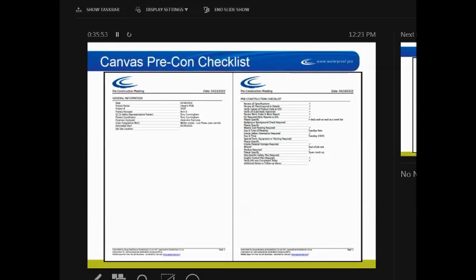Verify the copies of product data and SDS. I went on a pre-con last month, and we didn't have the product data. We were trying to pull it up on our phones. We went to Google, trying to pull up the installation details because we didn't know the overlap of the waterproofing. We didn't know if it was 3 inches, if it was 4 or 5.